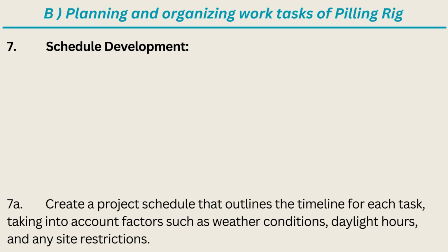7. Schedule development. 7A. Create a project schedule that outlines the timeline for each task, taking into account factors such as weather conditions, daylight hours, and any site restrictions.